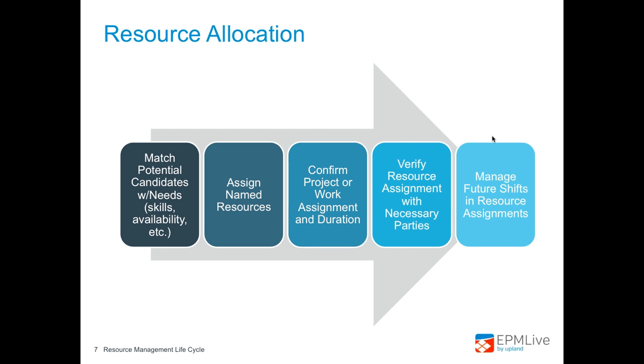In many cases, if project teams are already over-allocated, there may be a need to consider acquiring resources from a third-party vendor or consulting firm. You may also consider whether having a virtual team will be adequate for your resource management needs. After resources are assigned and confirmed, you'll need to be prepared to manage all future changes that could potentially come into play, to ensure your plan is flexible, scalable, and able to handle unexpected shifts in resource demand and allocation.